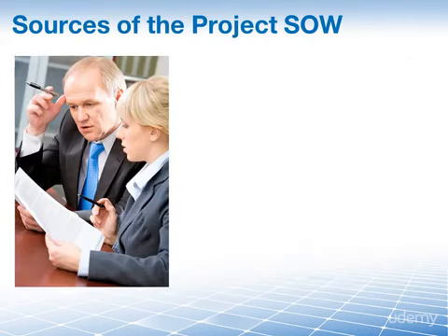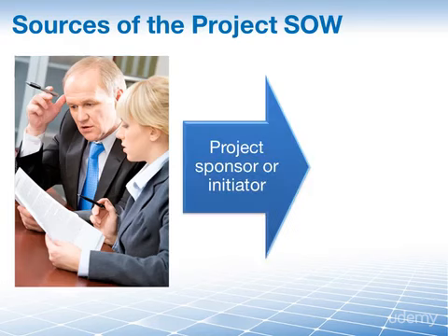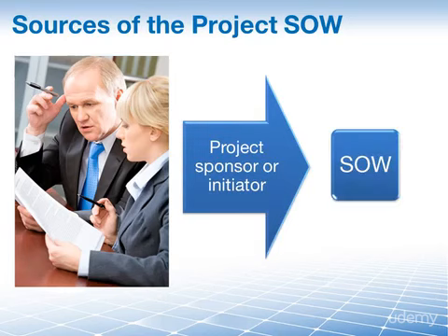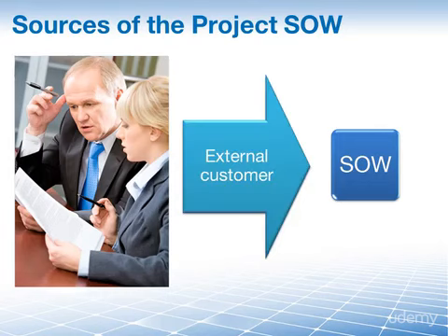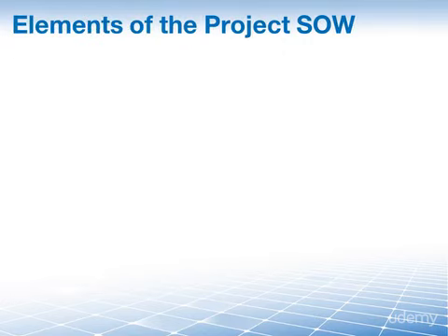Who provides the project statement of work is very much dependent on where the energy or impetus for the project comes from. For internally driven projects, the project statement of work is provided by the project initiator or project sponsor, while for externally driven projects, the customer usually provides the project statement of work. It is common for the external customers to include the project statement of work as part of their request for proposal. Just as with the business case, no two SOWs are alike. However, there are 7 items that are likely to be covered in most statements of work.